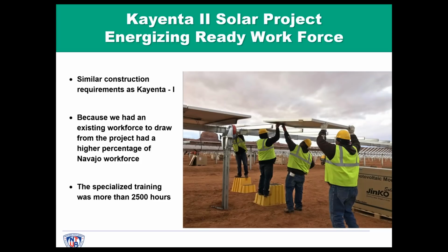So just to give you a sense of the way we sequenced these two projects and why it worked very, very well from a construction and employment standpoint, the construction requirements were very similar, in fact, almost duplicate to Kayenta 1 and Kayenta 2. We had an existing workforce that we had already trained for Kayenta 1, and therefore we were able to continue to use most of that workforce for Kayenta 2.